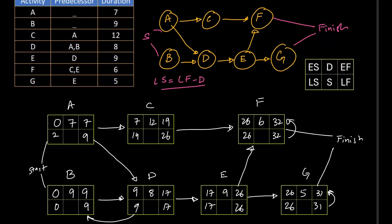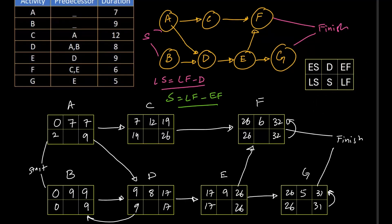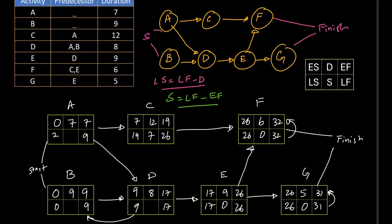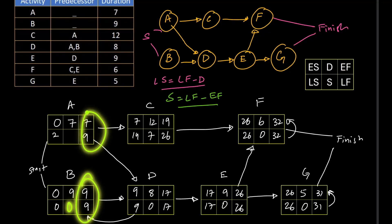Now finally we need to find out slack. Slack is calculated as LS minus ES, or equivalently LF minus EF. All activities in this project have a slack value of 0.